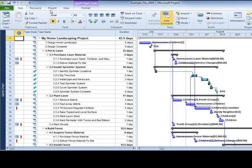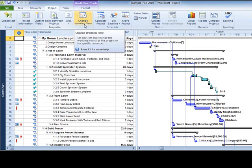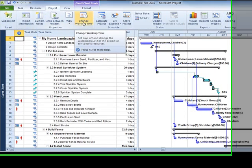The Project tab contains features that affect the entire project, such as changing the calendar, here found in Change Working Time.